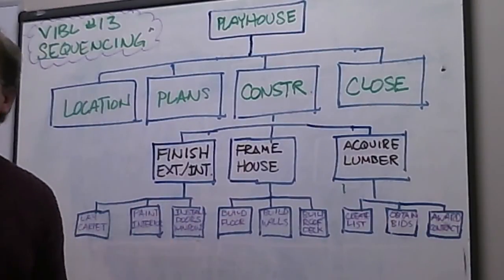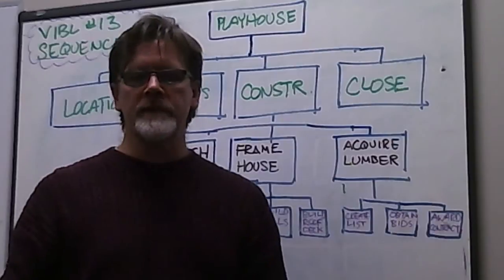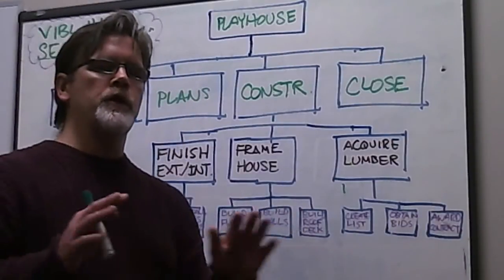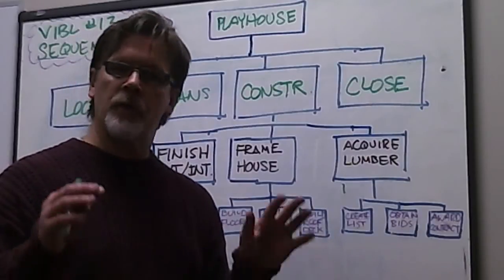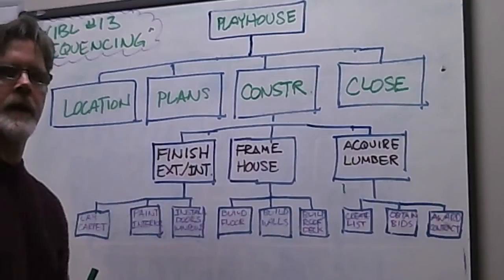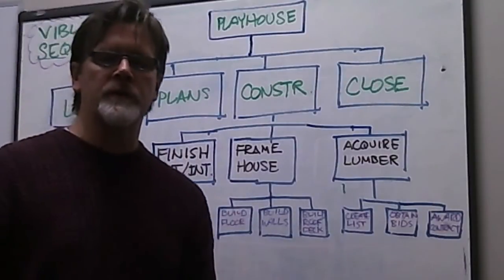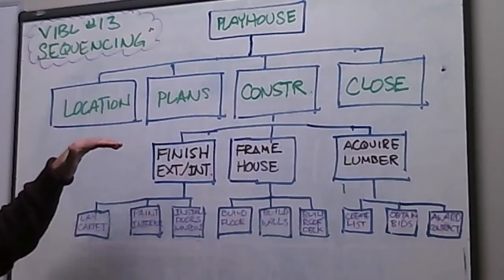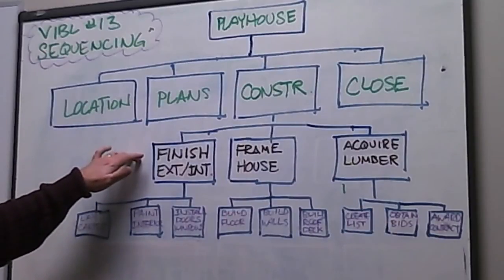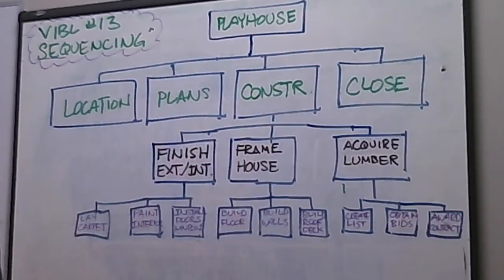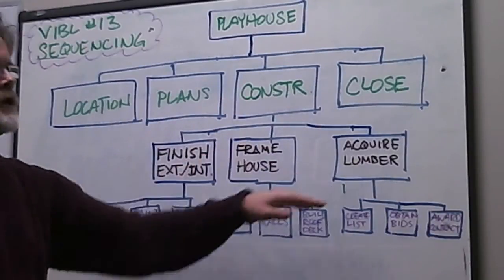Now, the question is, where does sequencing play? Well, I want us to understand that you need to be cognizant and recognize the fact that whatever tier that you develop your network and your sequencing, you must be consistent. So if you develop a sequence using your work packages, then you've got, in this particular case with the summary task, three items that you need to sequence.